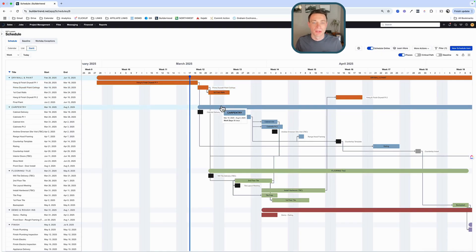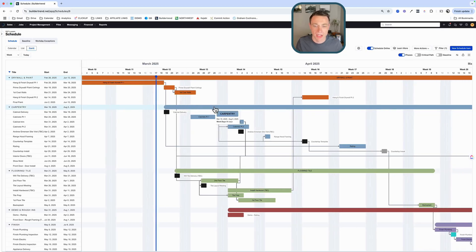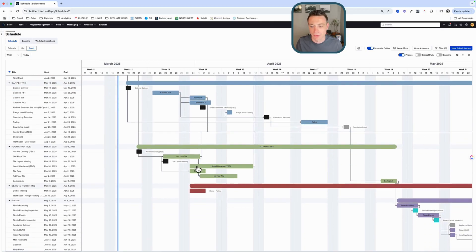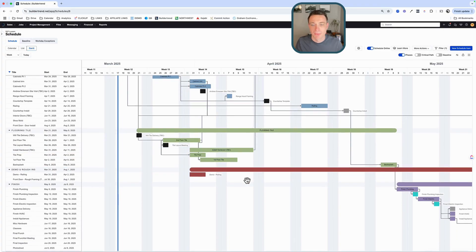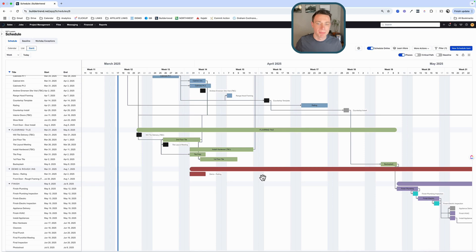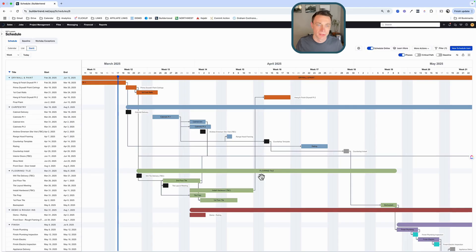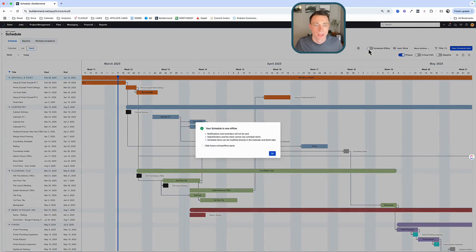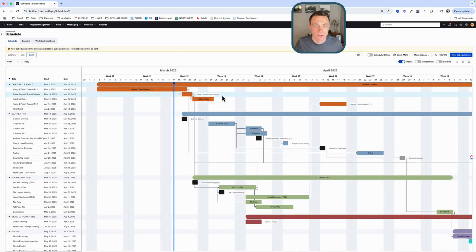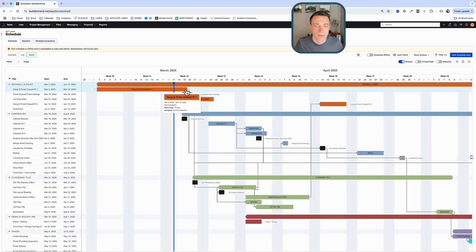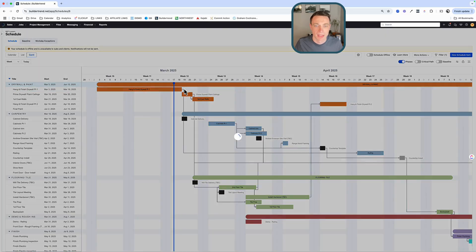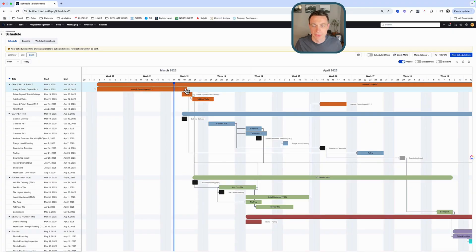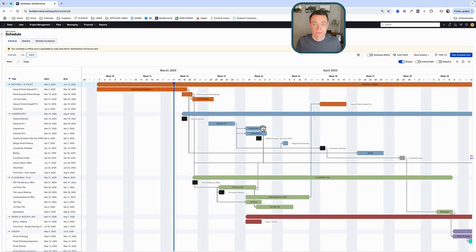The level of specificity must fit the way your project actually works. You don't want to create it so it's so specific that we don't do it. And we want to build in some dependencies. These dependencies don't need to be super tight, but what's essential is that if and when something at the front of the schedule, the early part of the schedule moves, I want to see the schedule update. Everything should move with it. That's kind of the key. This moving moves the whole schedule. That's really the essential part of these dependencies.